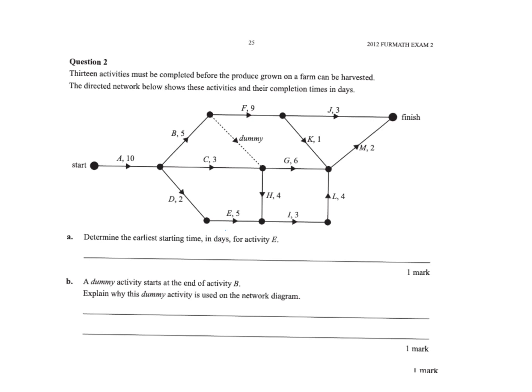So we could just start at the start. We've got A is 0, and then we can do our other ones. B would be 10, but I'm heading down towards E, so I'll go down this way. So D would start at 2, and then I'd have 10 plus for the E would be 12. So I can say the earliest starting time is 12.